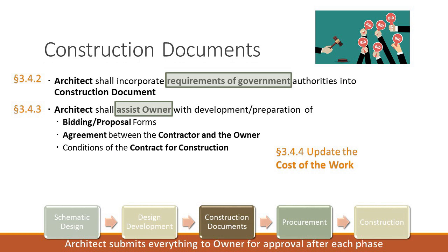3.4.2, you need to bring in design requirements of government authorities. So, as I said, sometimes you're in the process of putting these drawings together, and you get information and feedback from the governmental building department or what have you in the beginning of the construction document phase, sometimes in the middle, sometimes at the end. Like I said, this project I had up in Wisconsin, they had to do a whole bunch of revisions based on the things that the village had said after they had gotten everything ready, after they signed the contract, and the contractor actually started to break ground. Then they had to come in and stop everything to fix what the city or the village wanted.